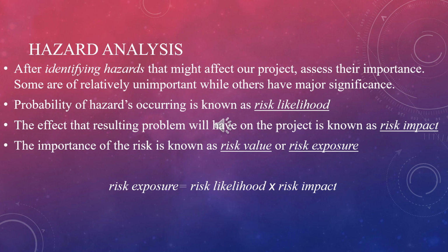Many risk managers use a simple scoring method to provide a quantitative measure for assessing each risk. Some just categorize likelihoods and impacts as high, medium, or low. But this form of ranking does not allow the calculation of a risk exposure.